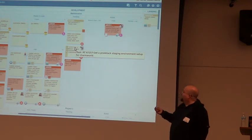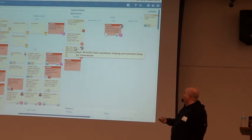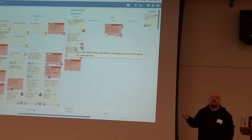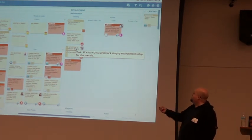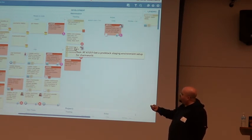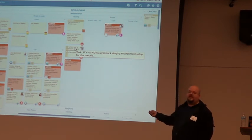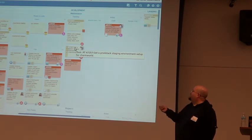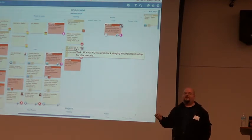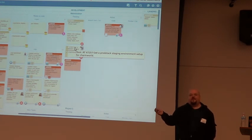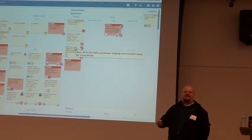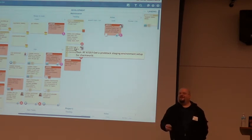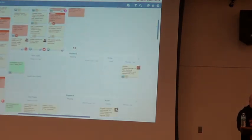You notice my head's on this one because I said I was going to write some docs and I haven't. So I suck. But, aside from that, it's this great visibility on what should I work on next, right? And then notice at the top, these numbers here, this 15, this 9, these are the work in progress limits. I will not put more than 15 maintenance cards in this lane. So, we will not all have maintenance stuff to work on. The urgent one will only be 9 urgent things at a time. Other than that, then the lane's a lie. If we've got more than 9 urgent items, which for us each one is about a day, so we've got a week worth of work in urgent, then that just says we've got bigger problems.